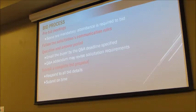And then once we collect all those questions, we answer them all at once and put a bid addendum out there. So all the questions are answered, and all the bidders get to see the same information. Any of your clients should be discouraged from trying to call in with questions. This is really high level, but we'll talk in more detail in 201. Again, tell them to make sure they respond to all of the details. More detail later, but that will really get them in trouble if they don't.